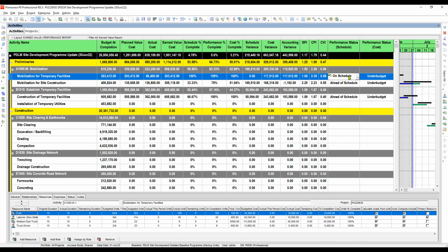You can choose it here, just click it and select whichever fits the value of the SPI. Since 1 is the threshold, when the SPI of the activity equals 1, it is on schedule.